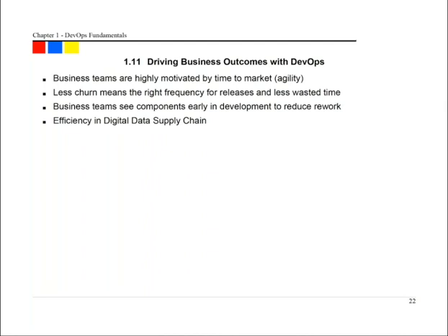So now when business sees competitors doing something, they don't kind of throw a bunch of things into a request bucket and kind of wait a year or so. They throw a bunch of things into a product backlog, and those things get prioritized, and some of those things start coming out pretty early, and they can actually start to respond to competitive actions. They can also see what works and what doesn't. Say, oh, this idea we had, it sounded really good, but actually we need to do this slightly other thing to really make it a great idea. And you actually have the scope and ability to be that agile and deliver that.